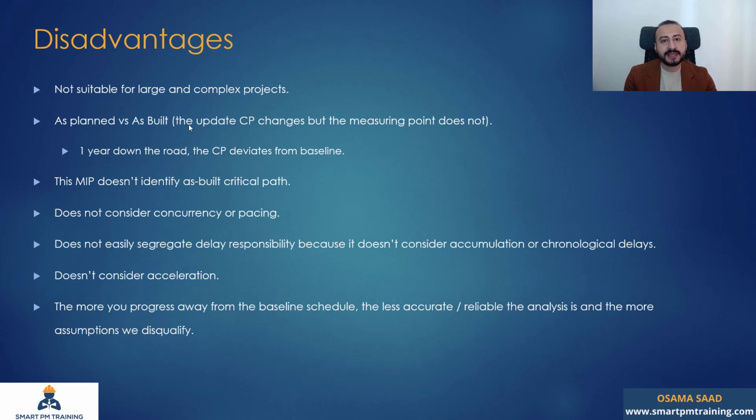We try to make schedule changes throughout the project to refine the schedule. It is normal to make schedule changes. For example, out of sequence is a good example of the assumptions that are different from the real case. You have assumed one sequence, for example, but the actual situation might have a different sequence.